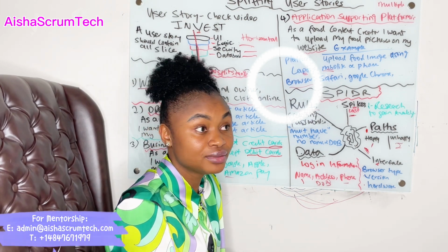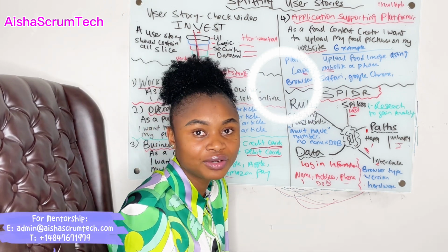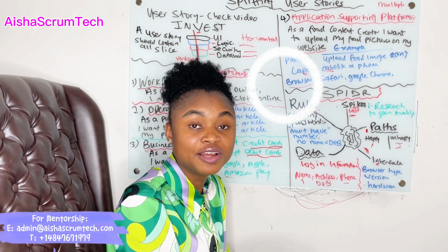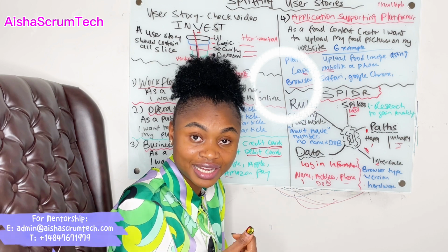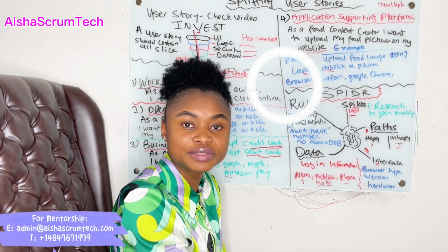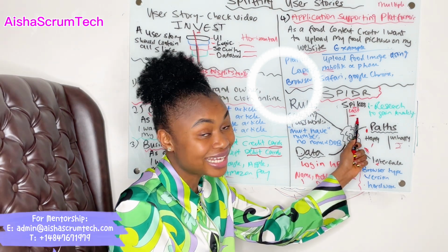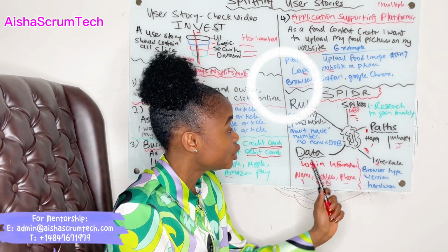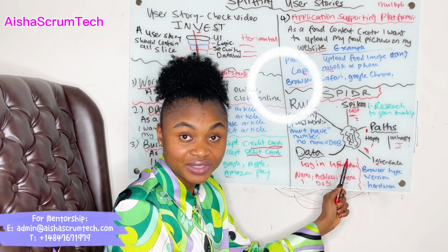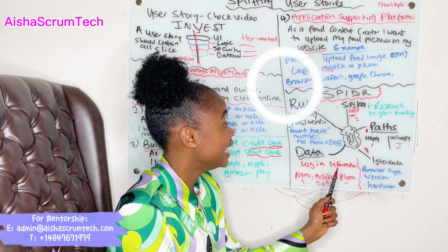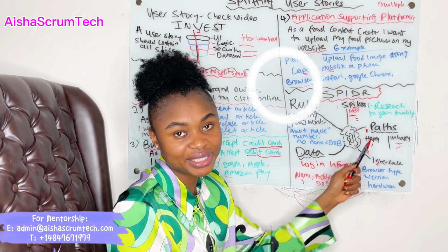Because if you just try to do something you don't know, it's more difficult than taking your time to learn it, and through your lessons from that, you now create or implement. So it's very important to do this last and not first. You should always try all these other parts first in splitting user story. And if none of that works, then your team can go into spike.